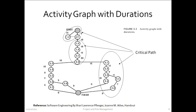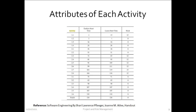Note that only activities that can be done in parallel with other activities have a slack time. This slide shows the earliest start time, latest start time, and slack time for every activity in the graph.